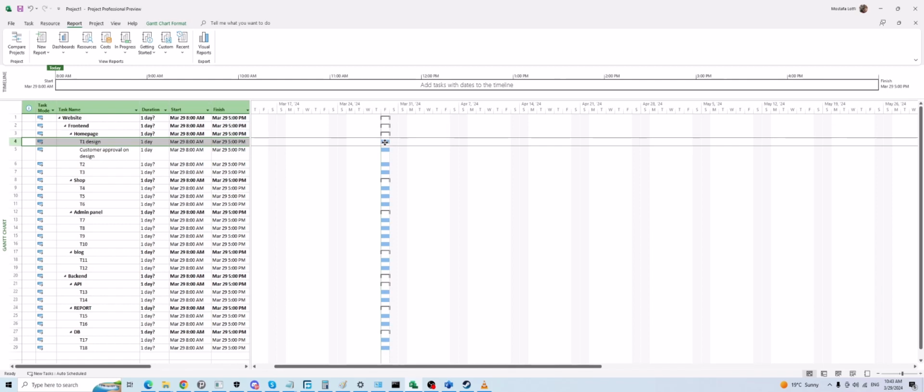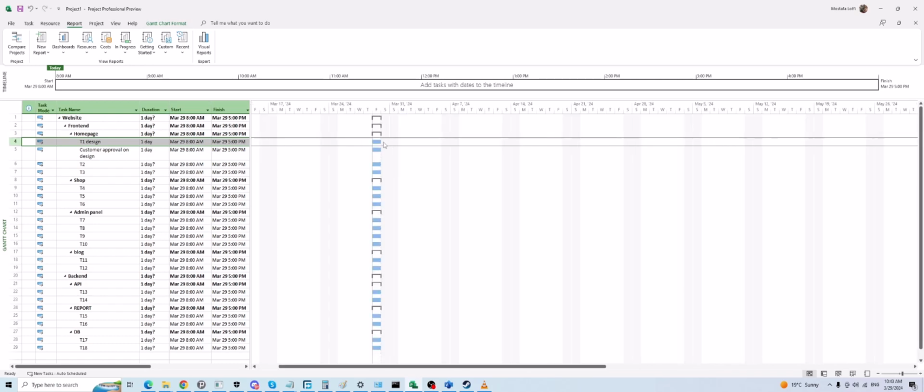Remember, when you want to drag or select the task, do not stand on the right side or left side, but a little bit in the middle, and then drag up or down and drop it. Also remember, when you select, do not drag left or right. When you select, drag up and down and then drop.